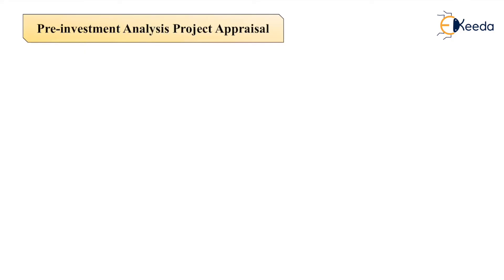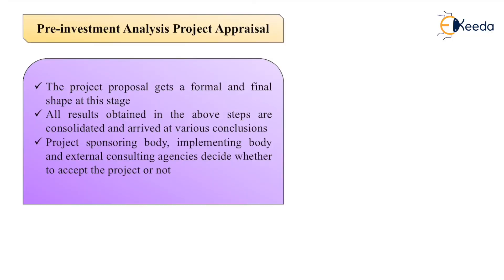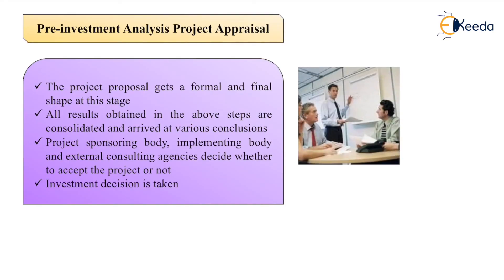And last is pre-investment analysis or project appraisal. The project proposal gets a formal and final shape at this stage. All results obtained in the above steps are consolidated and we arrive at various conclusions. The project sponsoring body, implementing body, and external consulting agencies decide whether to accept the project or not. And lastly, the investment decision is taken. If all are convinced, then we can proceed with this project. So in this video we have discussed about the project formation and its importance. Thank you.